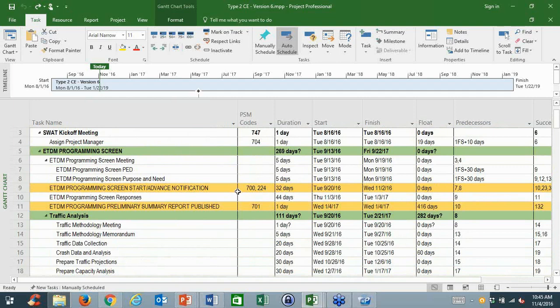What if a study is added to the current fiscal year by management without adequate time for pre-study activity, to do the pre-PD&E activities? No, you would include those activities. Your starting point would be what your starting point actually is. You're not forced to use these templates. You're forced to use the PSM codes themselves. So you set up your schedule based on the reality of your project. Sure. And if it's going to be a Type 2, an EA, or an EIS, they're also going to go through a screening anyway, regardless of when they pop up.